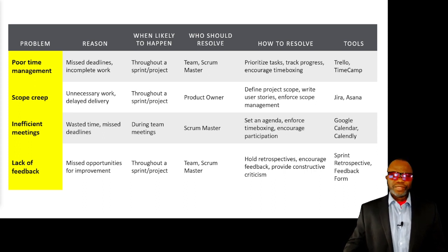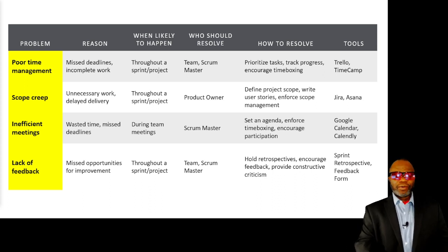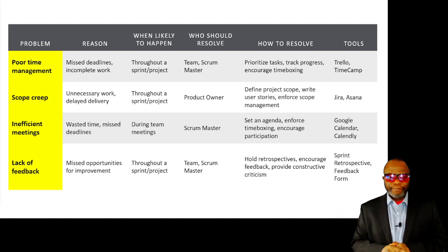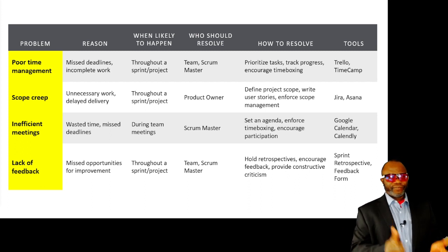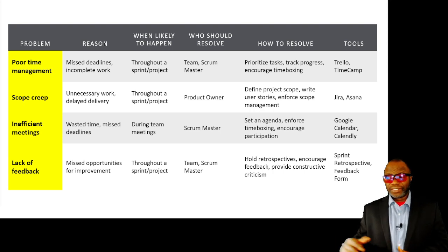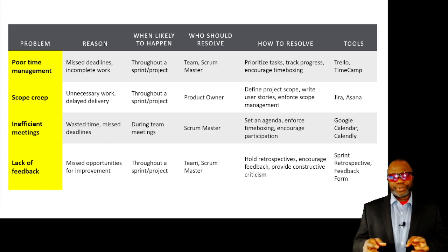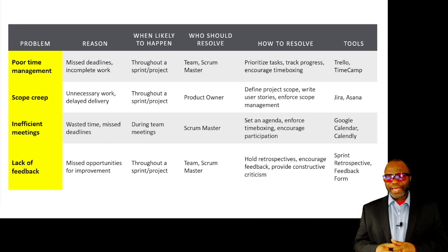Yeah, the product owner. So you know what I tell teams that have a whole bunch of scope creep here in the middle of the sprint, and out comes from management some person who says, hey team, I'd really like for you to do this and blah, blah, blah. Well, if the team leaves everything fallow, just leaves what they're working on, abandons it, and goes in pursuit of this new thing that the person said they want, then that team doesn't understand the rules of the game. They don't understand Scrum and how it should work. Once you're airborne in that sprint, my friends, there's no opening that cabin door. It's going to stay shut.